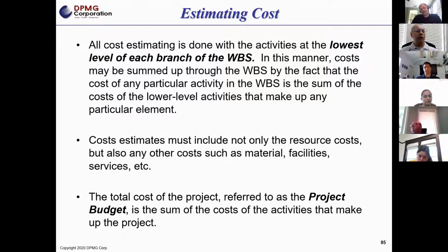From a rough estimate perspective, what we always recommend at the very least is to have a company rate regardless. Average everything out, put your factor on it, and say use this internal rate. It's not exact, but at least it's a ballpark that allows you to come up with a project budget from a labor perspective.